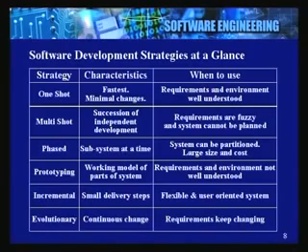Prototyping is a very important strategy. Prototyping in a different context can be mentioned as a sampling activity. Now, let's take a simple example. Suppose I am interested in testing 5,000 programs and somebody recommends use of a new tool, and I may not be wanting to commit all my activity using this particular tool because of no prior experience of using it. In such a case, I can always say, okay, let's take a small exercise, let's take 50, 100 programs out of the 5,000 that we have, and try to test them with this particular tool.